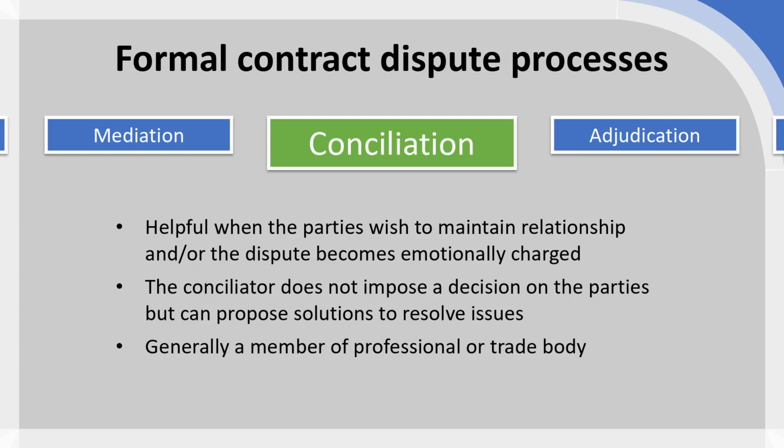So there is additional insight over most mediators, although mediators can also share those same insights, but there's no real requirement to do so. And this is because a conciliator can take a slightly more active role in the negotiation. So proposing solutions, for example, absolutely can be one way to try and move forward. And this is because a conciliator really does take the approach of attempting to reconcile the parties, hence the term.